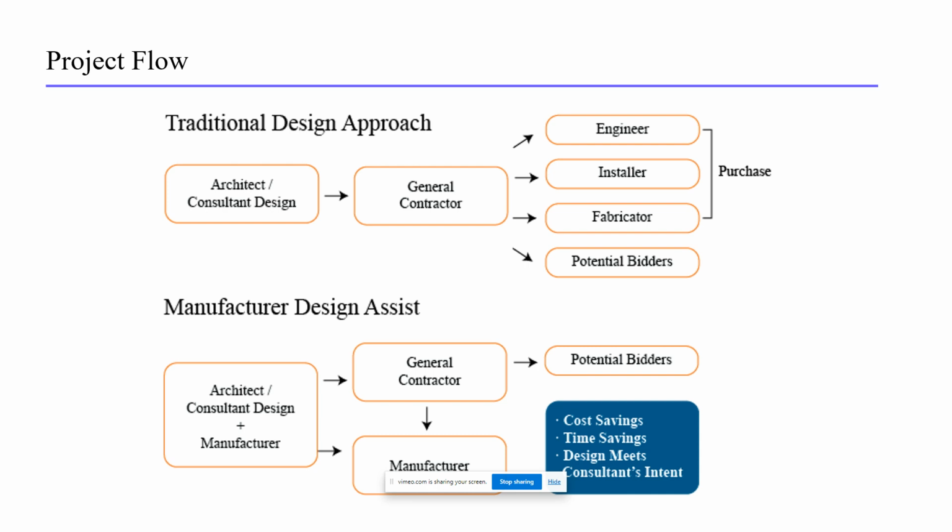The below chart illustrates the design assist approach. Especially useful for those custom applications. You involve the manufacturer early in the design budgeting process. Stakeholders gain deep insight into the variables that can affect budget, or you can make a design that fits within the budget. Potential risks incurred during production or installation caused by the unique design application can be addressed.